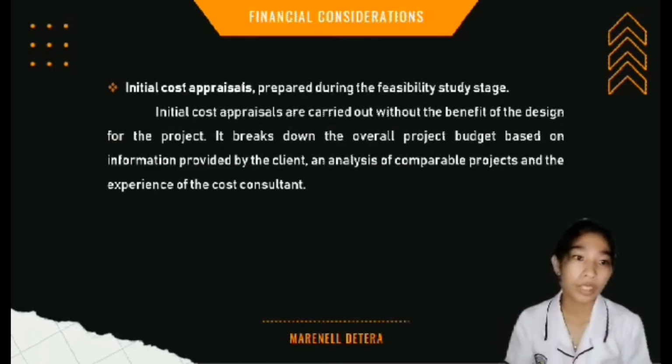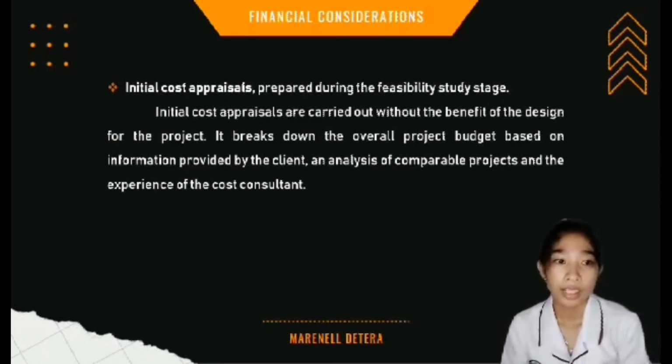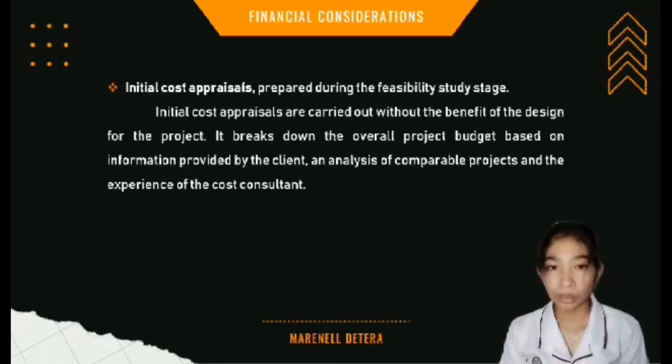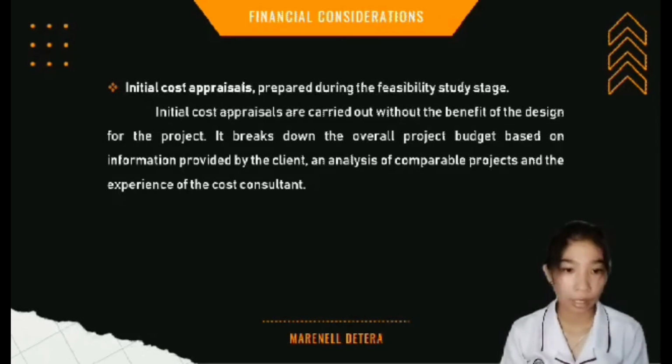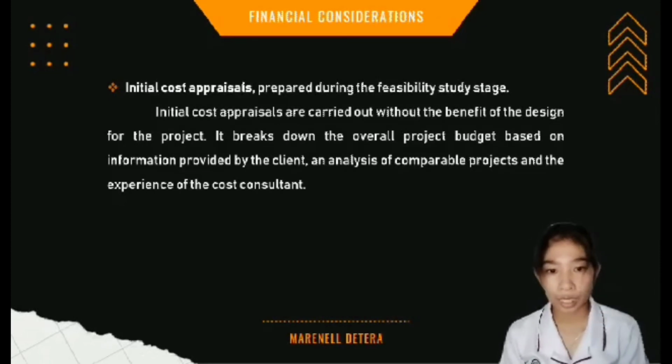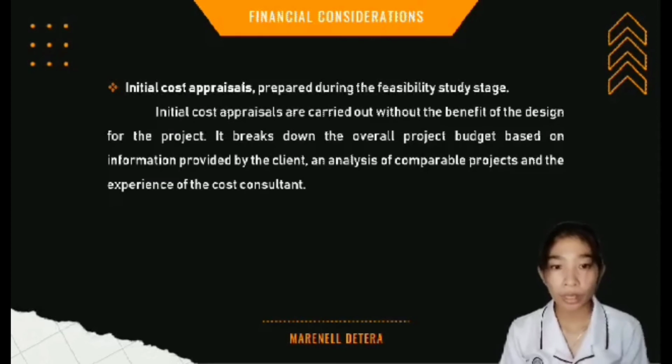It is prepared during the feasibility study stage. They include client costs that may not feature in later cost plans, and as a result, will almost certainly need input from the client's finance director or financial advisors. Once the initial cost appraisal is completed, the client will decide the scope of cost that will in future be monitored by the cost consultant, and those that will be monitored and controlled by the client organization.